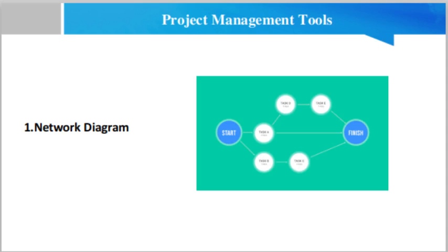The last but not the least assumption is that network diagrams have no choice but to start with a single event and end with a single event, because there is no place for dual start and end points. If the project manager wants to calculate the total duration of a specific project, they need to define a total of 4 dates for each specific